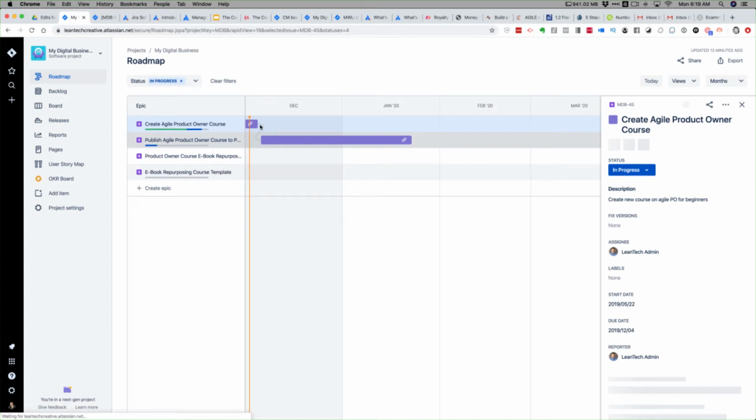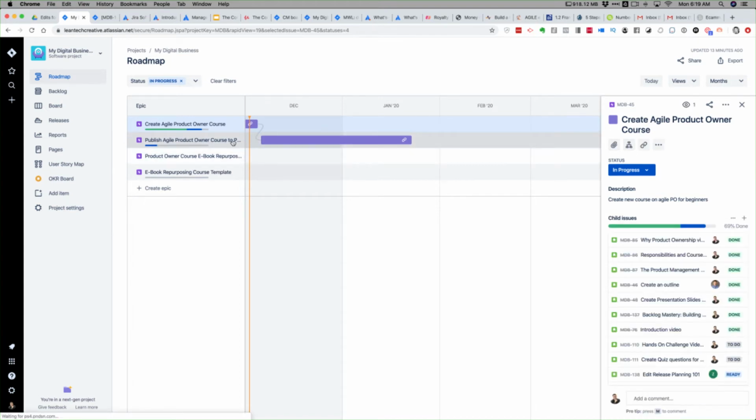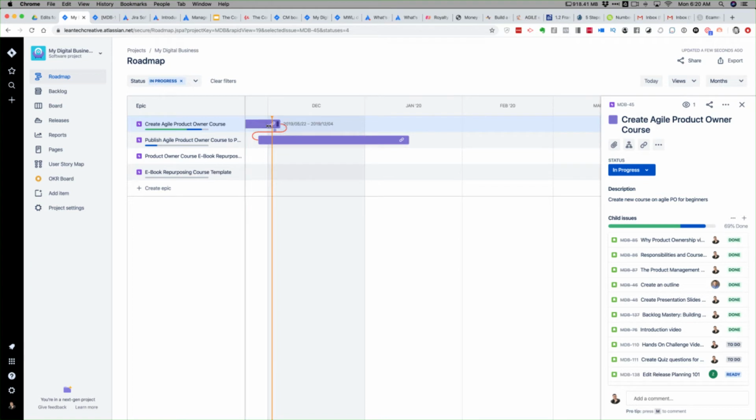a dependency I linked here to publishing this course onto the various platforms, because I don't just publish on Udemy. I publish on Skillshare, StackCommerce, and a few other sites as well. So I can link those dependencies and see where it's red, if I have some work started that can't be started before something else. So this is just a nice visual way, especially if you have a lot of projects in flux, to visualize where there might be some bottlenecks or some areas to call attention to.